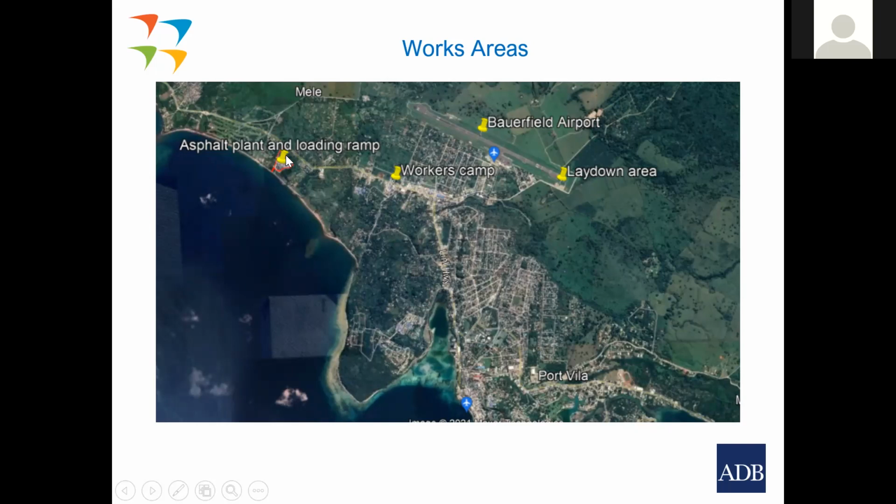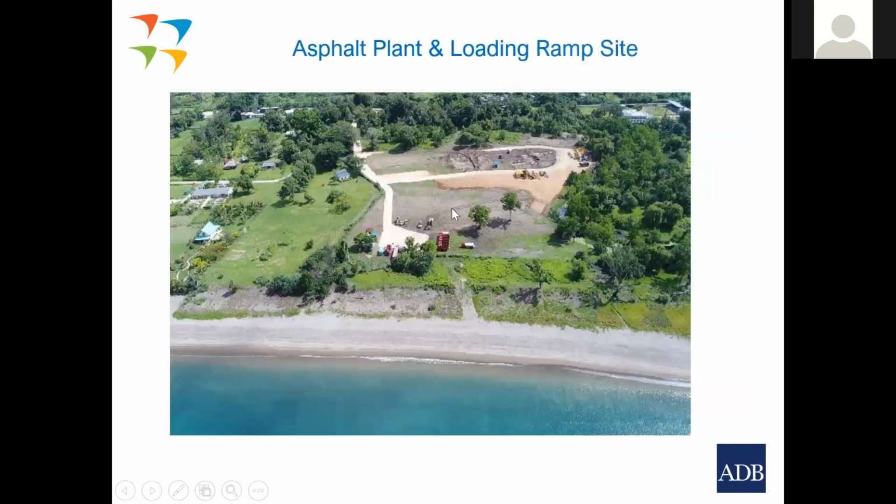And so he located this area here, and he rented this area, and then he had to get various approvals, including updating a fairly detailed construction environmental management plan, because there were a number of significant sensitive receptors here. We've got a residential development here.